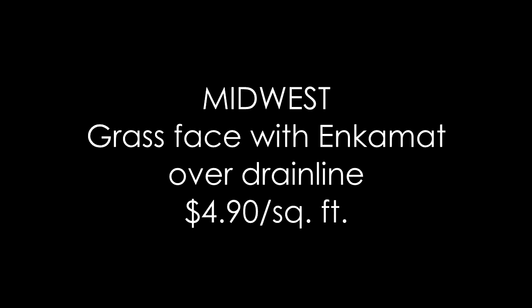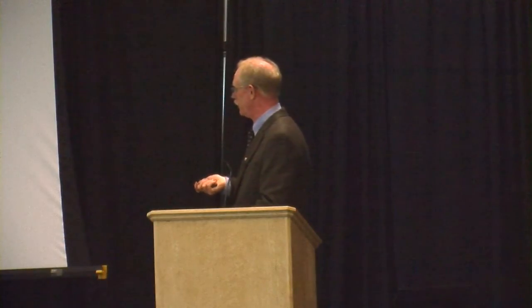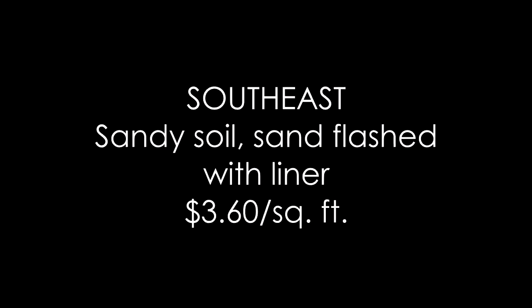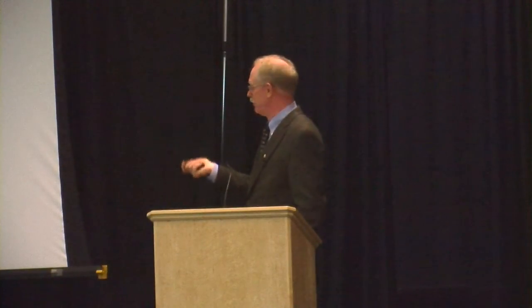Now, in the Midwest, a grass face with the Enkamat over it, the drainline, like what we saw at Kirtland Country Club, that's just under $5 a square foot. If you go way down in Florida with sandy soil, flash bunkers, the price really drops because of the material you're working with. You can see it's a good drop. High volume bunker projects here and here between Florida and Georgia, and you can see the price is significantly less in Florida.